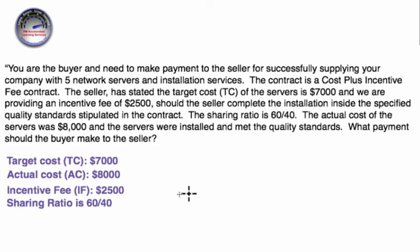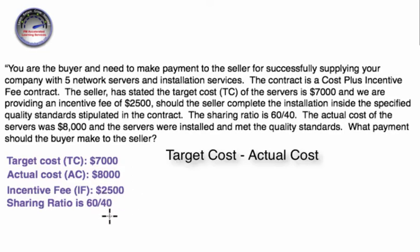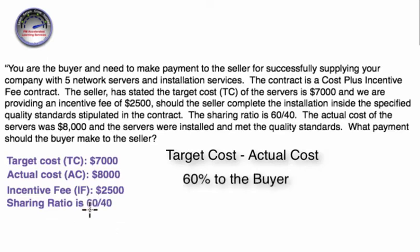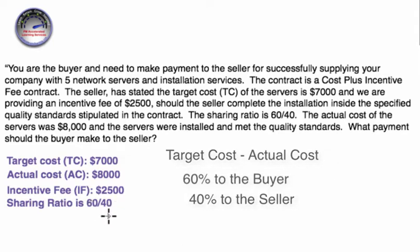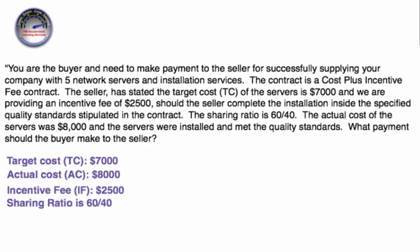What does that mean? It means that if there is a difference between the actual cost and the target cost, 60% of that difference is the responsibility of the buyer and 40% of the difference is the responsibility of the seller.